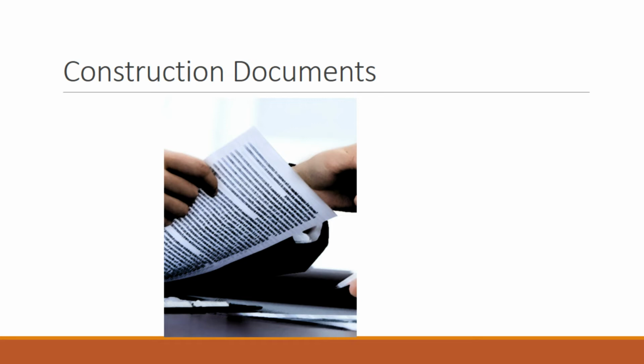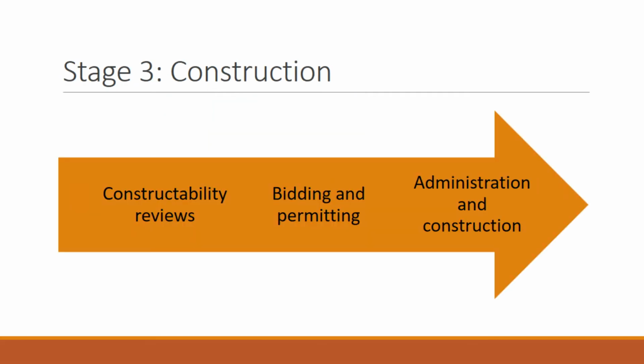Estimates that are around 90% complete should have only an error of 5 to 10%. And at this point, projections include vendor estimates, and comprehensive unit takeoffs are included as well. And that really concludes stage 2.